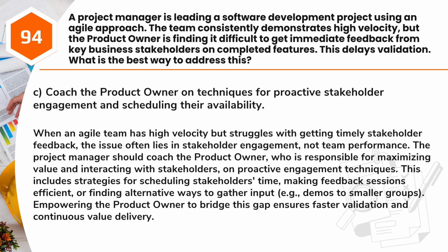Answer: C. Coach the product owner on techniques for proactive stakeholder engagement and scheduling their availability. When an agile team has high velocity but struggles with getting timely stakeholder feedback, the issue often lies in stakeholder engagement, not team performance. The project manager should coach the product owner, who is responsible for maximizing value and interacting with stakeholders, on proactive engagement techniques.